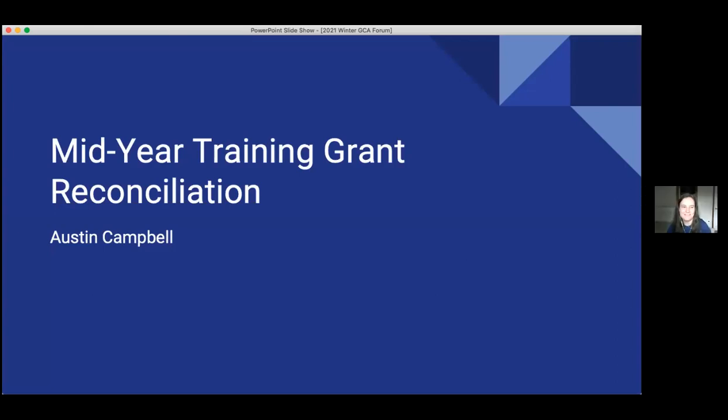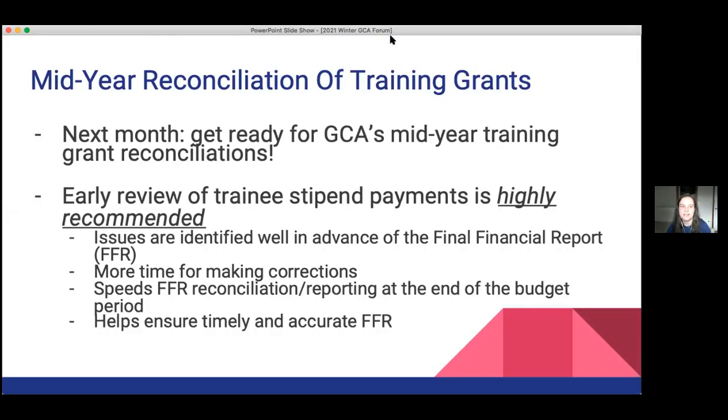All right, so I'm Austin again, and I'll be talking about mid-year training grant reconciliation. So next month, GCA will be doing a mid-year training grant reconciliation. We tried this out last year, and it proved to alleviate issues later down the road when it came time to complete the final financial report. Beyond our mid-year reconciliation, early review of trainee stipend payments is highly recommended. Depending on the situation, corrections can be timely, so getting a head start will reduce the risk of a late report submission.